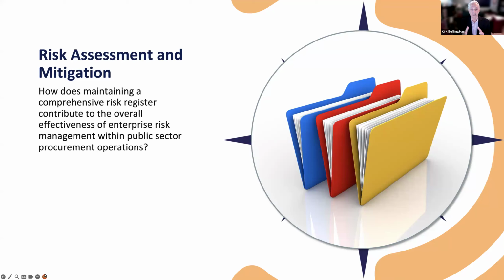I advocate that a surety bond is the best and only security for both bid and performance that agencies should accept. Because a letter of credit isn't going to get the project completed if the contractor fails. You may get the cash represented by the letter of credit, and let's say it's 50% of the contract value, and the contractor has only finished 45% or 40%. That leaves you with two huge challenges. One, how do you finish the project? Two, where are you going to get the rest of the cash to finish it? Plus, you have warranty issues. So that's a good thing to remember.